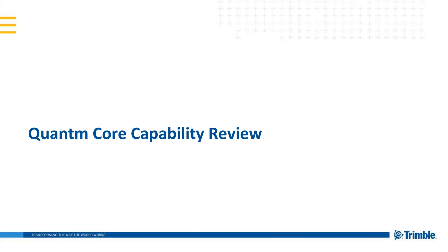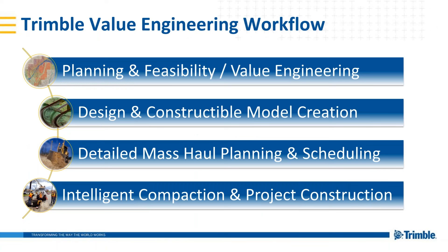Now we'll touch on the core capability review — what the system does, how it handles optimization routines, and how it interacts with your project data. Quantum fits into the value engineering workflow at the planning and feasibility stage: you take the model, do your optimization with Quantum, balance your earthworks, ensure alignments are optimal, then bring that into Trimble Business Center for design and constructible model creation. From there, if you want to feed out to machine control, you can effectively do rough grading with alignments generated from Quantum.